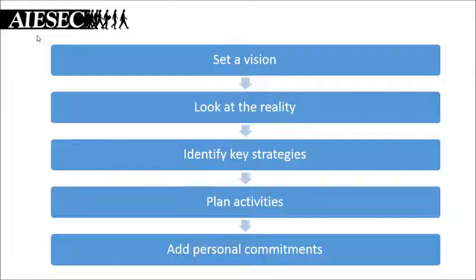What should the venue be like? What should the outcome of the content be? What kind of resources do you need? Then look at the current reality. What kind of people do you have in your team? What kind of finances do you have? What kind of supporters does your organization already have? And then look at the gap between the reality and the vision. How much money are you lacking? What kind of people do you still need to recruit? The project plan is a plan of activities of how to cover these gaps with resources.